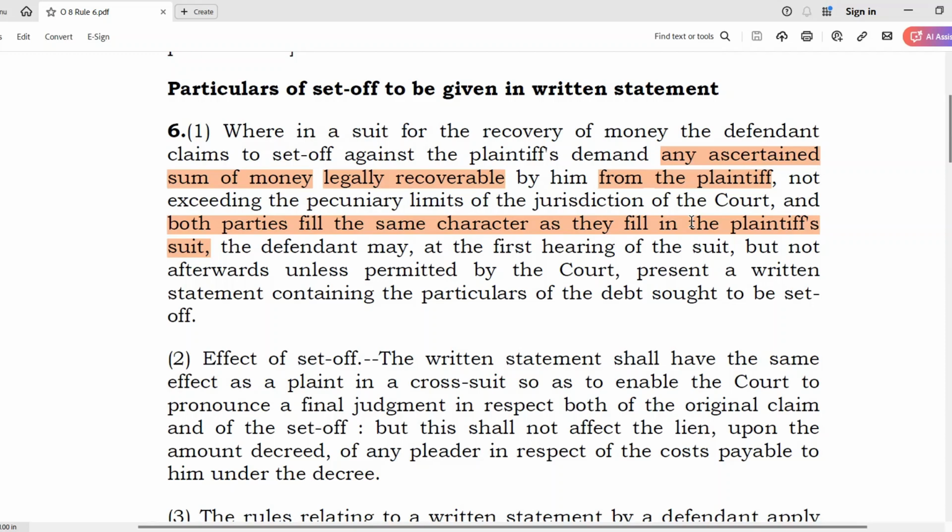Suppose there is a company which supplies material, and the buyer and the seller have entered into a long-term supply agreement. From time to time, the buyer places an order on the supplier. Now, each purchase order read with the master supply agreement can be treated as a separate contract.